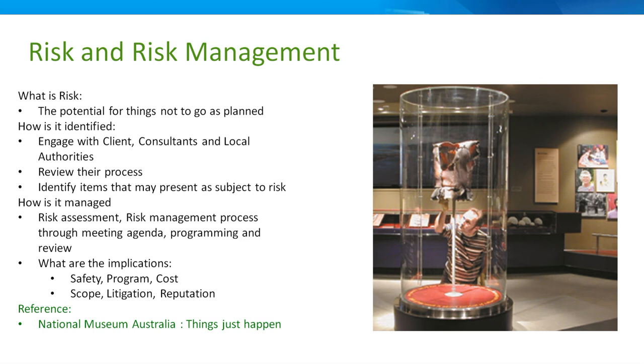But the QA process, setting up a project and identifying risk and then creating a risk register and monitoring risk in the meetings. It could be time, budget, or supplied items. It could be shop drawings or some particular detailing that's tricky. We use that in our normal course of our minuted meetings and communication with our subcontractors or project managers. We've got a job working at the moment where there was a delay because of a detailing issue on a tricky roof.